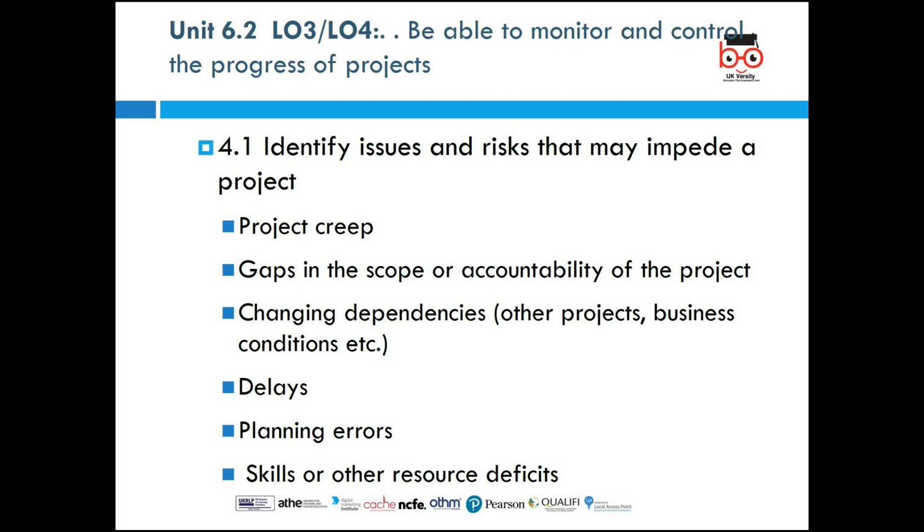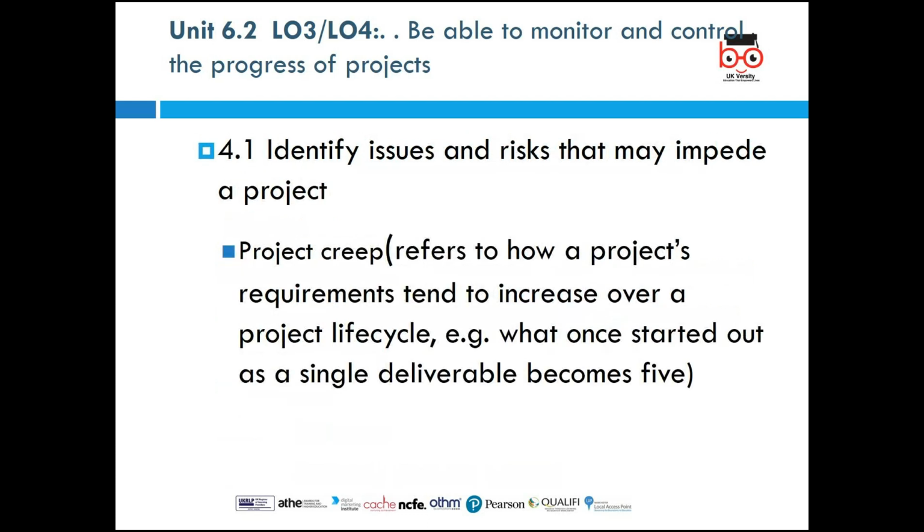Also, we might have resource deficit, shortage of materials, resources. At a point in time, you might use up all your resources, and if you're not planning very well to replenish it or to outsource the resources, you might end up having a project delay. So these are all issues and risks that are possible to impede a project.